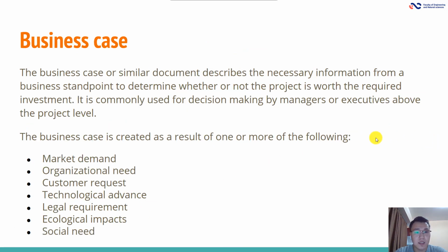Business case. The business case or similar document describes the necessary information from a business standpoint to determine whether or not the project is worth the required investment. It is commonly used for decision making by managers or executives above the project level. The business case is created as a result of one or more of the following: market demand, organizational need, customer request, technological advance, legal requirement, ecological impact, and social need.